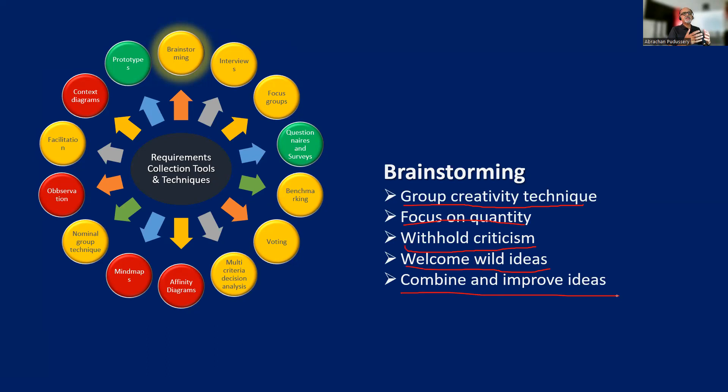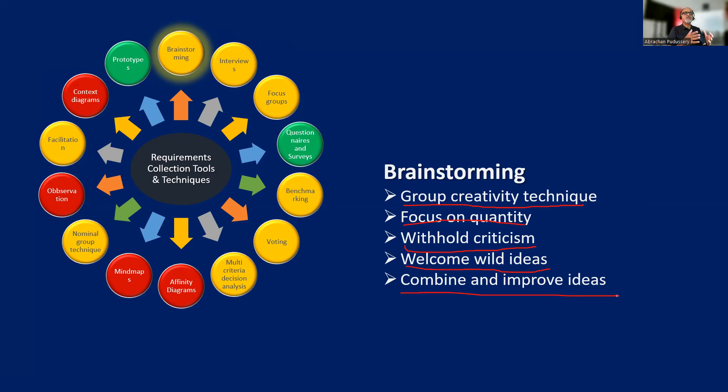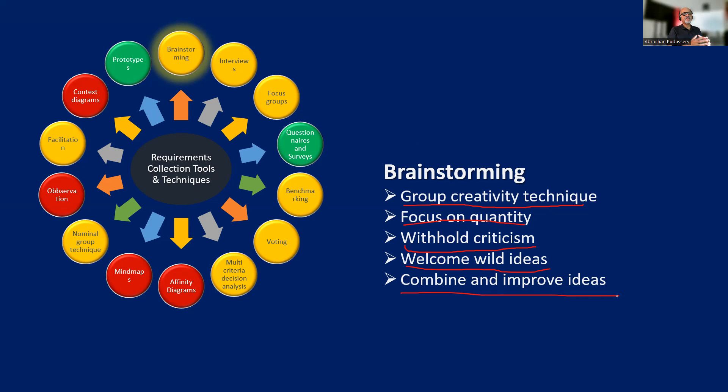We welcome wild ideas. And sometimes if we get related ideas, we combine them and build upon each other's ideas. Typically, a brainstorming is facilitated by a facilitator, and everybody in the room will get an equal opportunity to participate. The ideas are captured, sometimes grouped and classified. The key thing here is we don't get into validation of those ideas. Our objective is to generate as many ideas as possible.